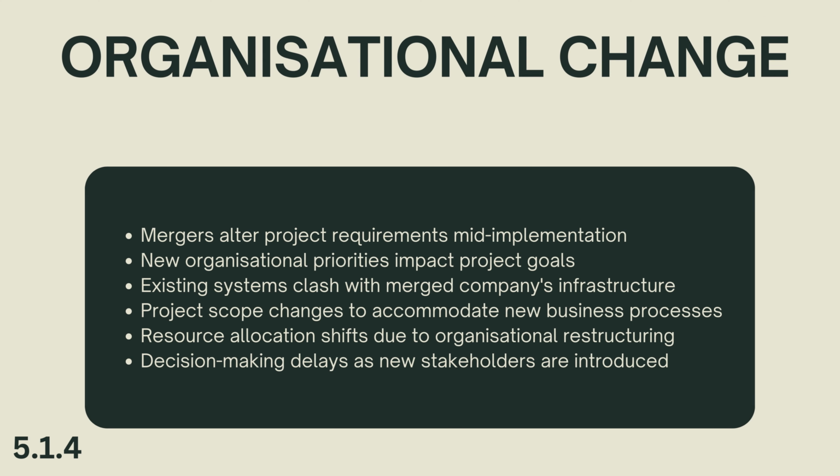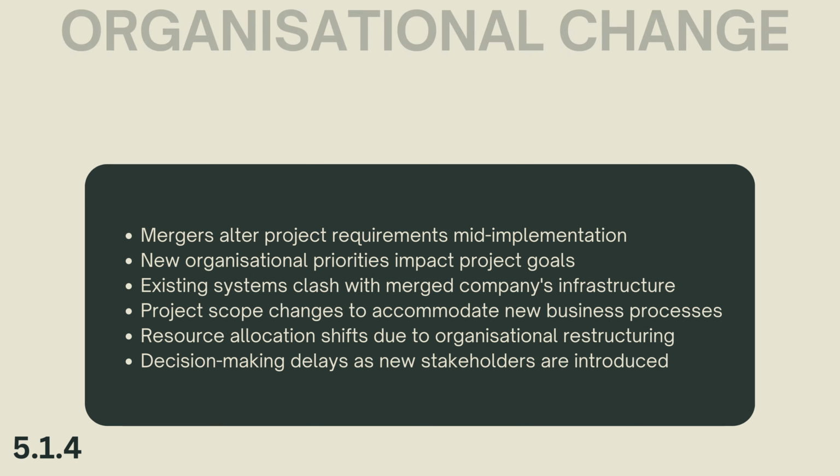Another risk factor is organizational change. For instance, if the organization merges with another company part way through the project, it can have a significant impact on the project requirements. The new merged entity might have different priorities, systems, or processes that need to be accommodated.